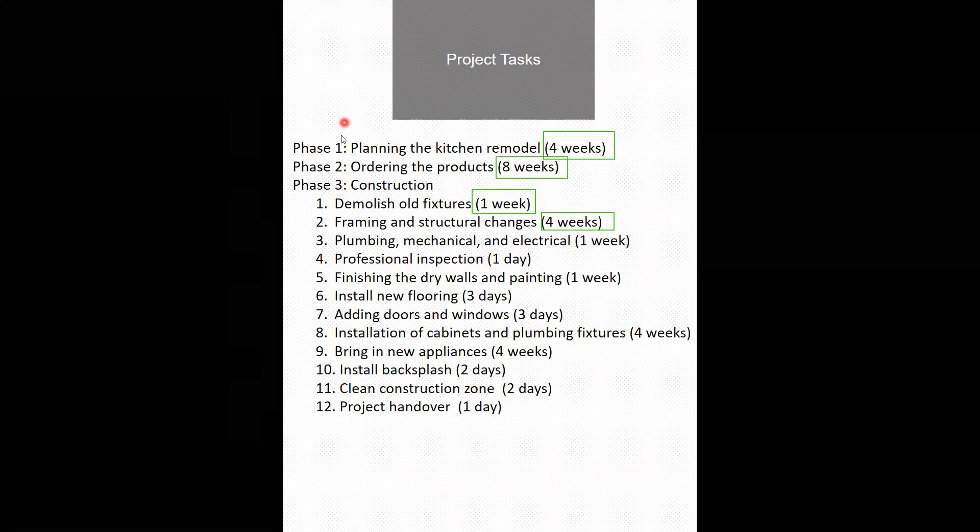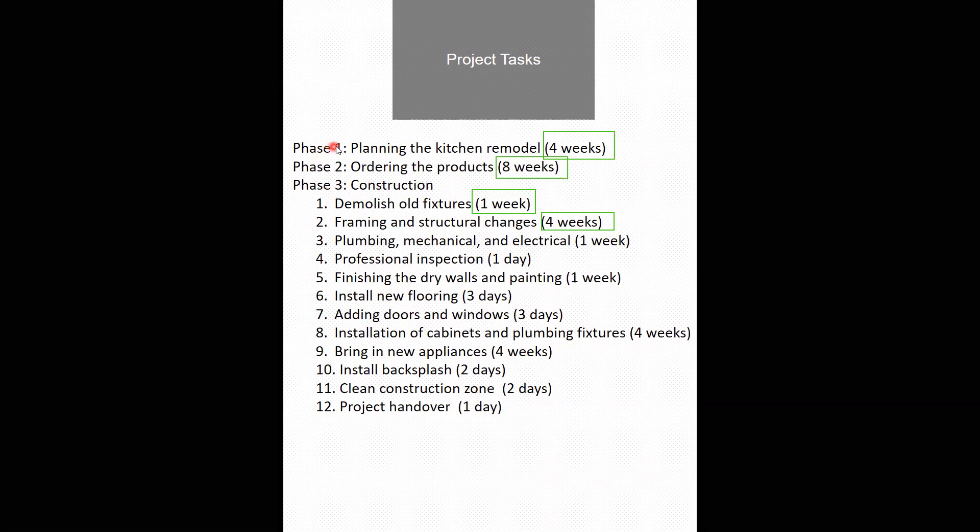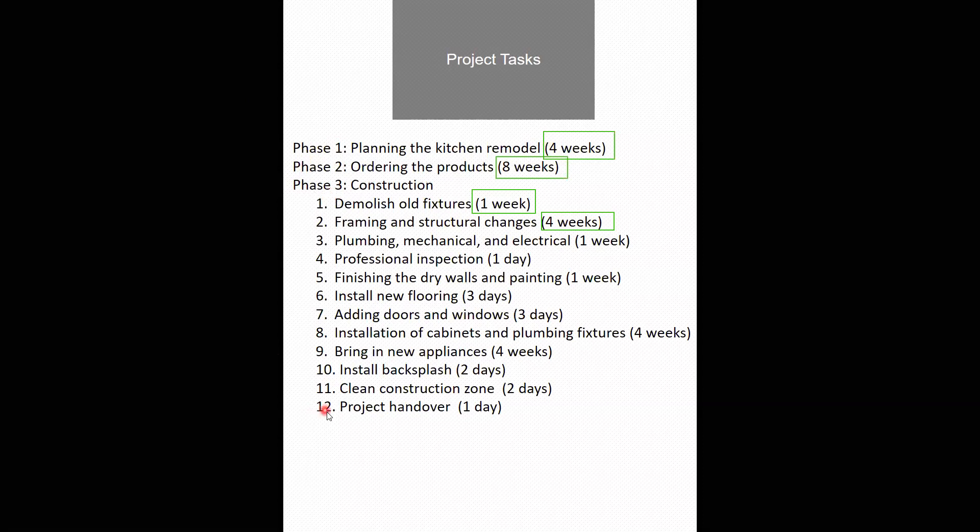In my project there is no overlapping schedule. That means I have to complete phase one within four weeks before moving on to phase two and then complete it within eight weeks before moving on to phase three. Phase three has 12 sub phases and each of these phases must be completed before moving on to the subsequent phase.